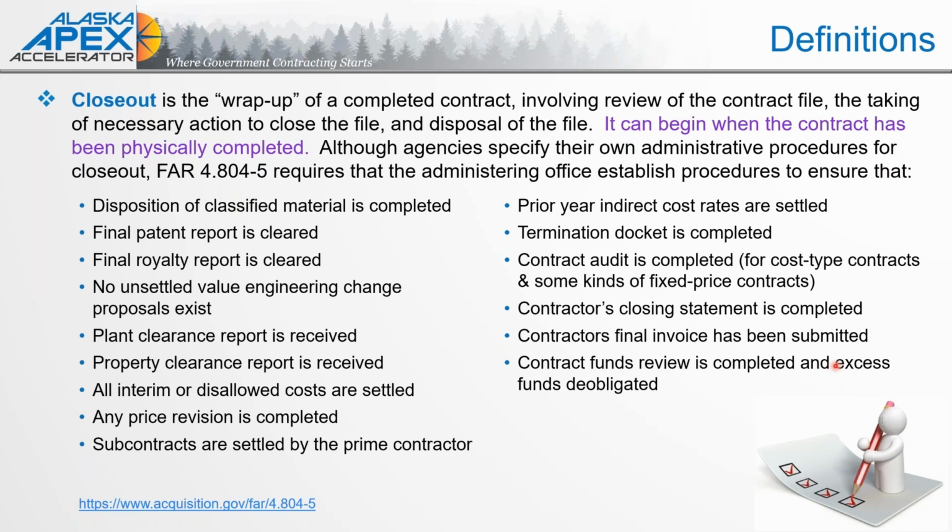Now, keep in mind, again, in that world of option years, you may have excess funds on an option year, and then the new option year is being awarded with those additional funds. You want to talk to the contracting officer on that. In that case, if you do have excess funds on the option year, how do they want you to burn through that? Because these funds have all the fiscal legal requirements that they're 1 year money, sometimes once that next year's funds have been obligated, you are no longer supposed to be spending against last year's funds.